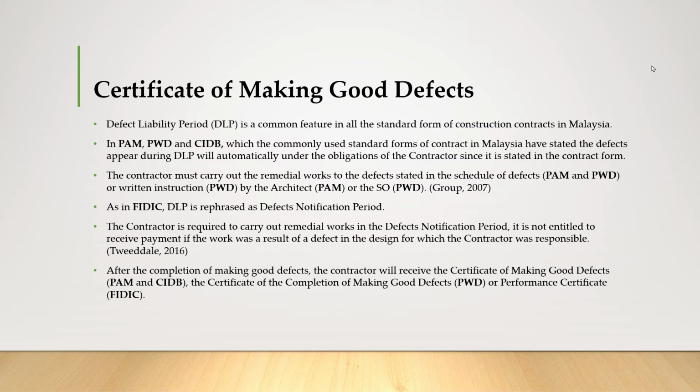As in FIDIC, DLP is rephrased as the defects notification period, the DNP. The contractor is required to carry out remedial works in the defects notification period, but is not entitled to receive payment if the works resulted from a defect in the design for which the contractor was responsible. After the completion of making good defects, the contractor will receive the certificate of making good defects in PAM and CIDB, the certificate of completion of making good defects in PWD, or the performance certificate in FIDIC.